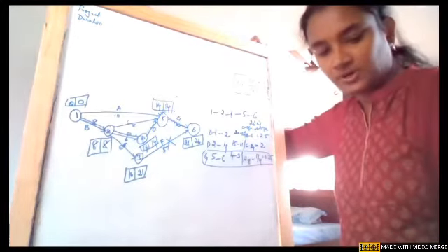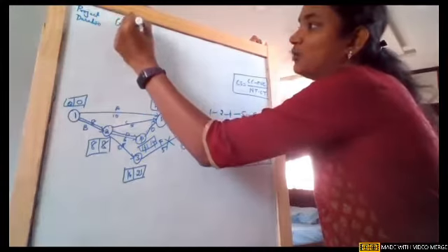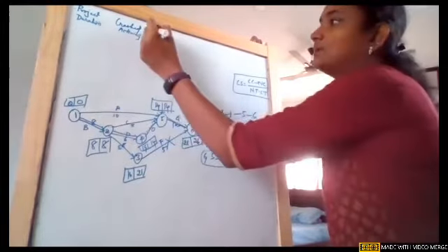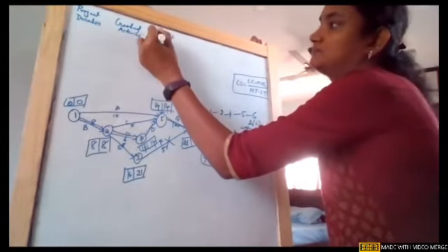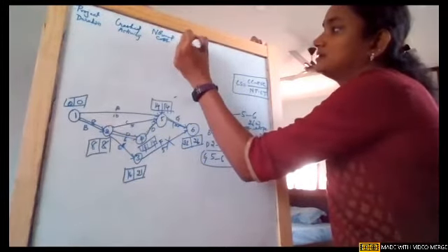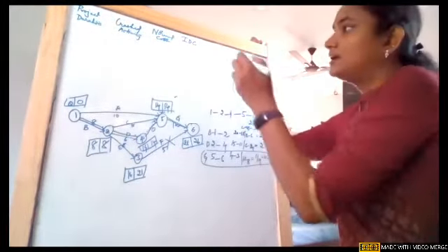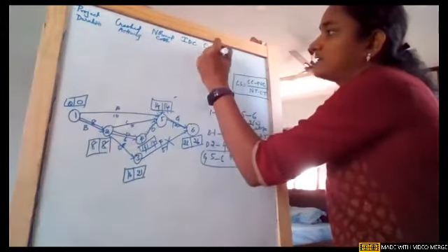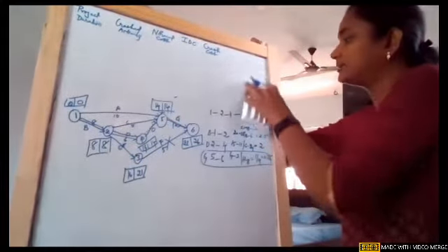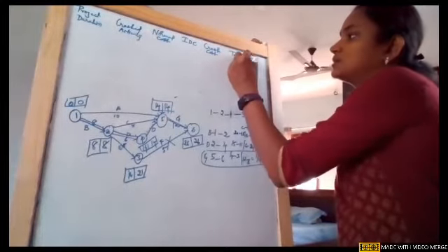Now the first column will obviously be the project duration, then the crashed activity. Then the normal cost, and then comes the indirect cost. Indirect cost is given as rupees 400 per day. Remember that statement. And then the crash cost. These are the 3 costs which will be included. If indirect cost is given only, we will include it. If it is not given, no problem. And then what is the total cost? So this is our table.